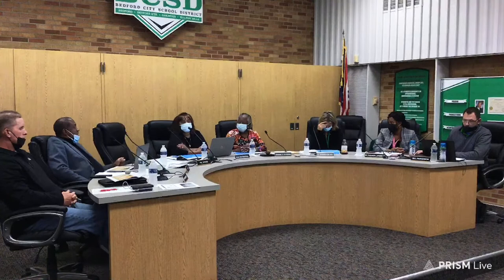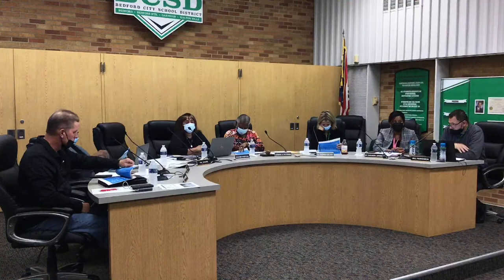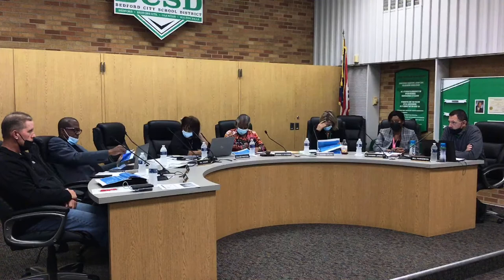I have a question. If the floors remain 84 feet, we wouldn't have to buy the hoops. Correct, the change order for number two backboards. So how much money are we saving if we keep it at 84? I'm saving roughly $60,000. Sure, $60,000, so you have 84 and keep the same backboard? Yep.